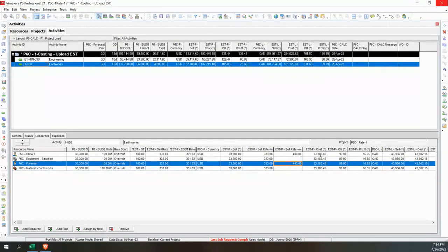Now, we have the cost, the project cost, but the cost plus the overhead and the profit, these three are what is totaling up to the sell value. Okay, so we can track all of those very cleanly, both in the project currency as well as the ledger currency. So we're tracking both the US and the Canadian in here.